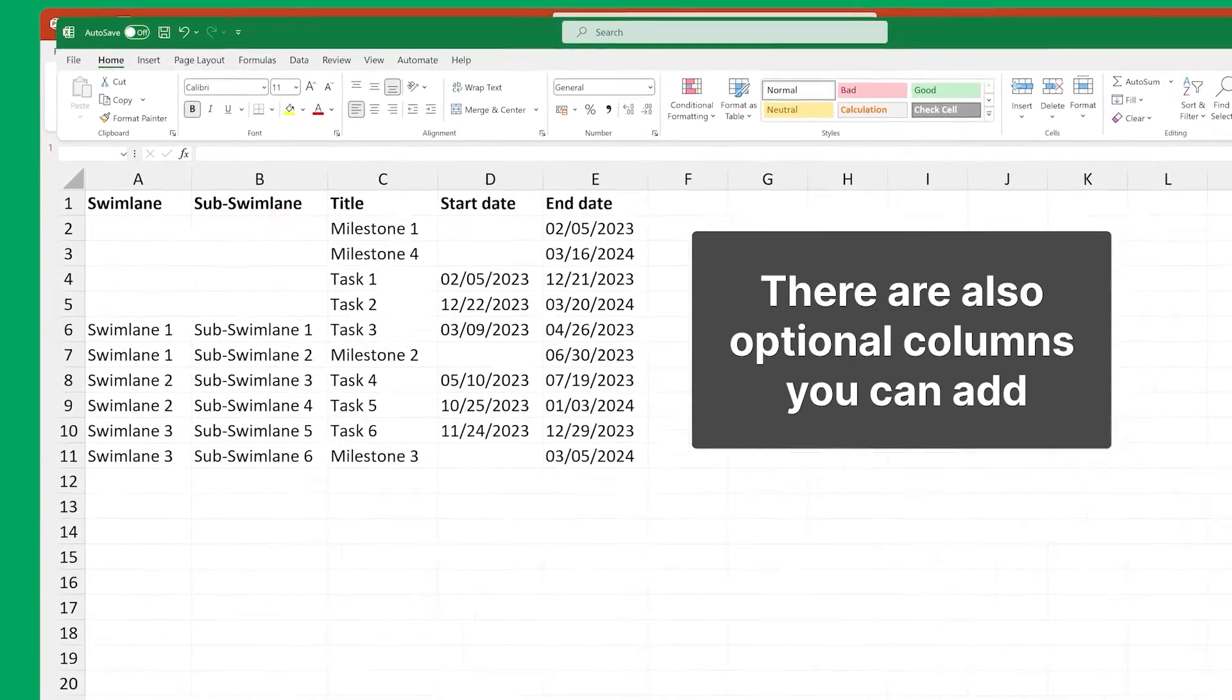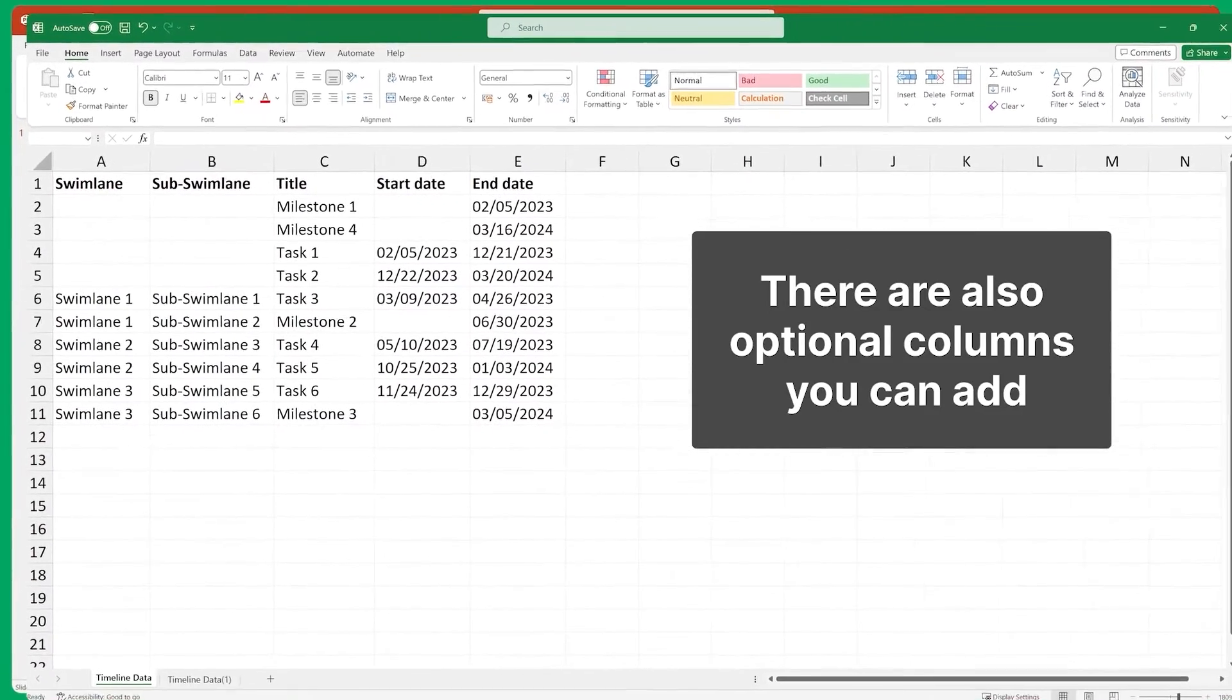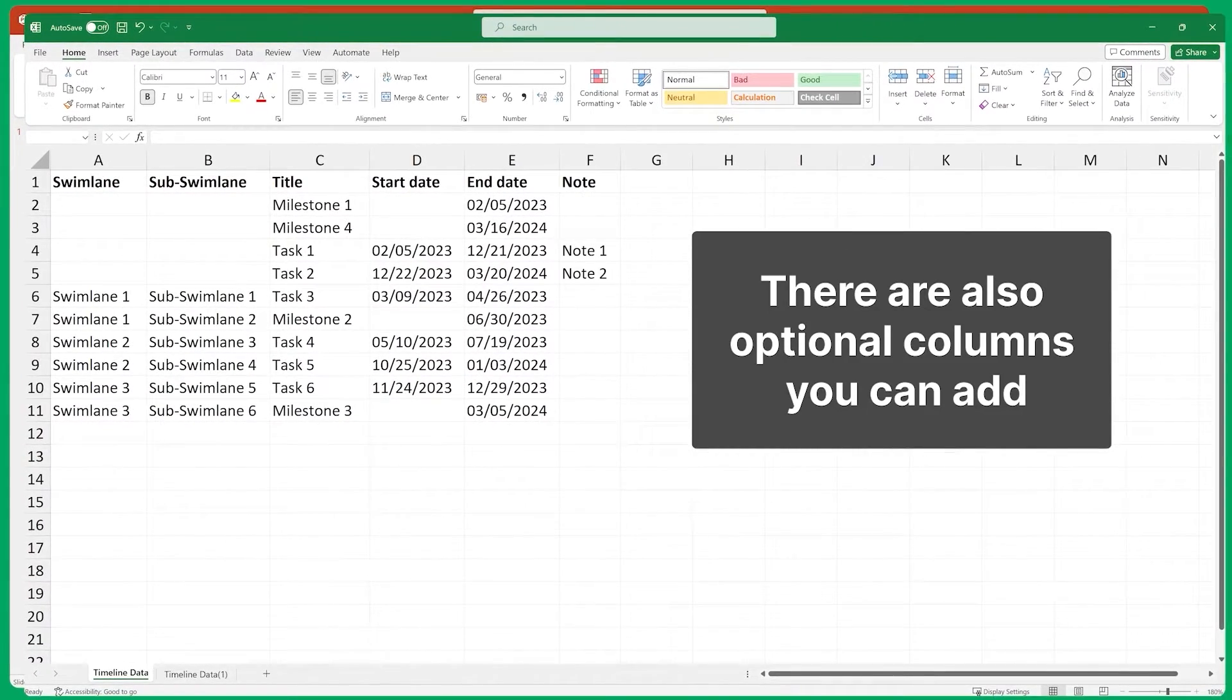There are also optional columns you can add, such as swim lanes, sub-swim lanes, notes, and percentage complete. Also, remember that for the free version of Office Timeline, you are limited to a maximum of 10 items per timeline.